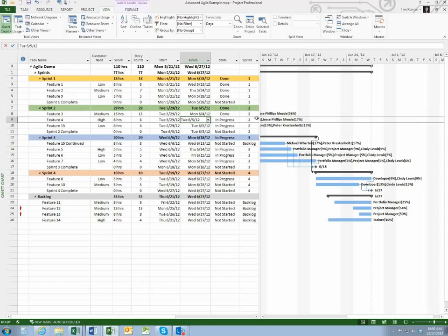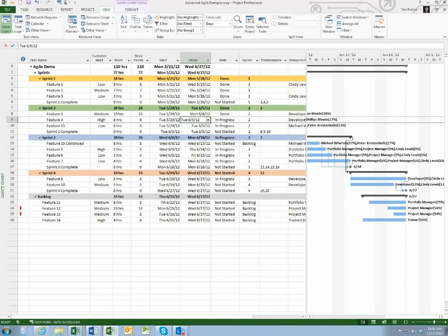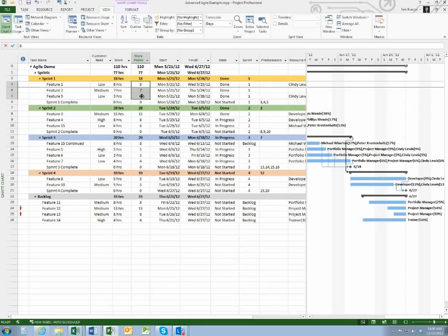to a task. Continuing this discussion, if we think in terms of setting up a good sprint or an agile schedule here, I like to track the state. So in many cases, if it's a 3-week or a 4-week sprint, you can have these ongoing activities, but establishing a field that says, is it done? Is it not started? Is it in progress? You know, where is that at? Is going to give us some very beneficial views as well as some business intelligence that we have in Project 2013 to help us really showcase the value of things that are done, not done, and then what did it take? What is that burn down that it took to deliver?